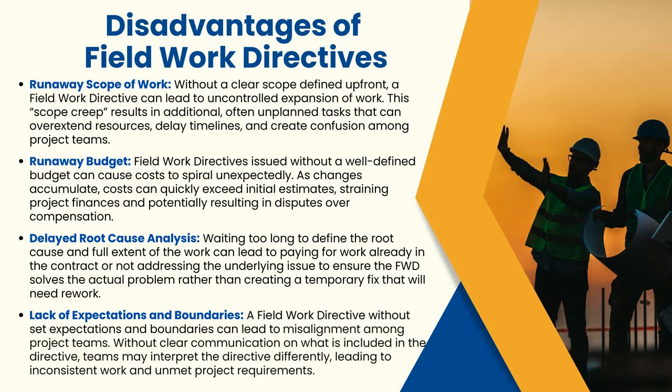So this can bring disadvantages that we want to be aware of when working with Field Work Directives. Obviously, there can be a runaway scope of work. This happens when the contractor continues to work in the flow of work that was approved when the lump sum not to exceed was identified, but they feel that they know that this is out of the scope, and in order to be able to continue with their other contractual work, they need to finish up this work that's under dispute. And so they continue working without getting updated verification that they're going to be paid or reimbursed for the effort that they've put into this.